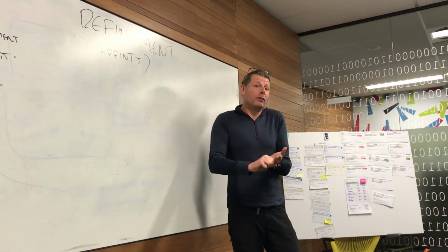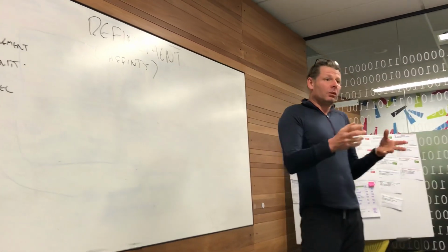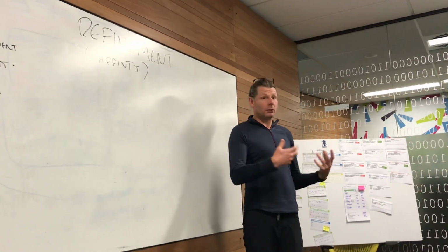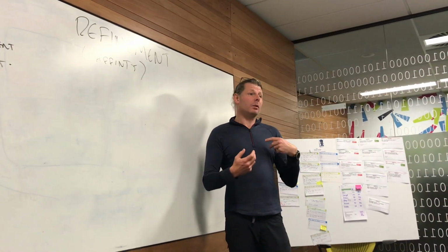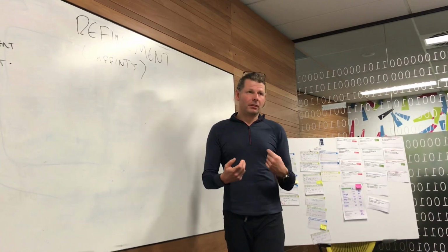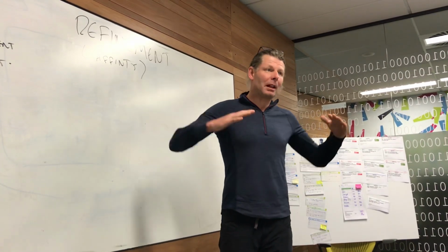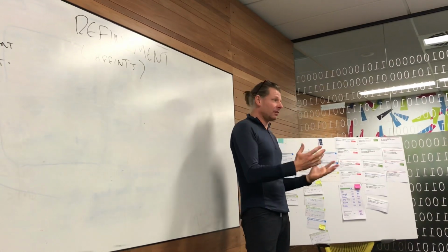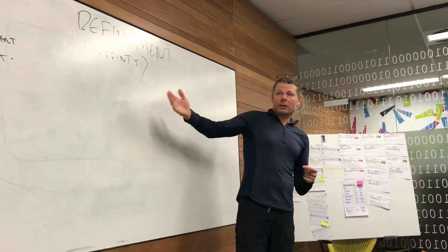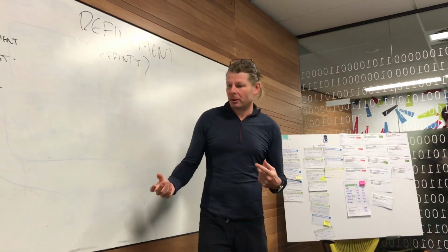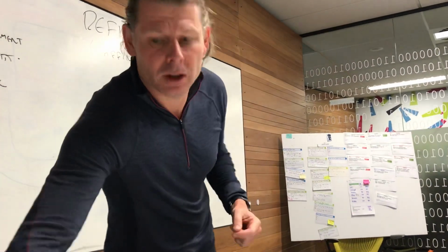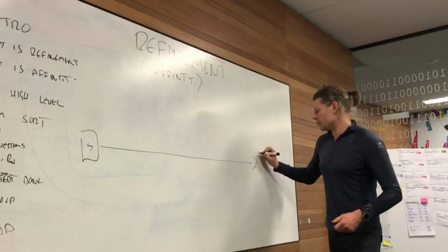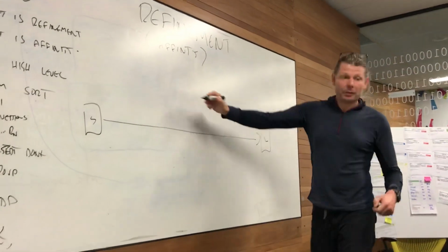The second thing is when we have conversations to size, usually the person with greatest influence is going to have an anchoring effect, a bias on other people. So that's why when we look at the way we're sizing, we have to use specific techniques to get the greatest value. So that bell curve of estimation is as narrow as possible, and we eliminate as much error as possible. What we do in Affinity is we're going to end up with a sequence of stories from the smallest all the way to the largest, and all of them in between.